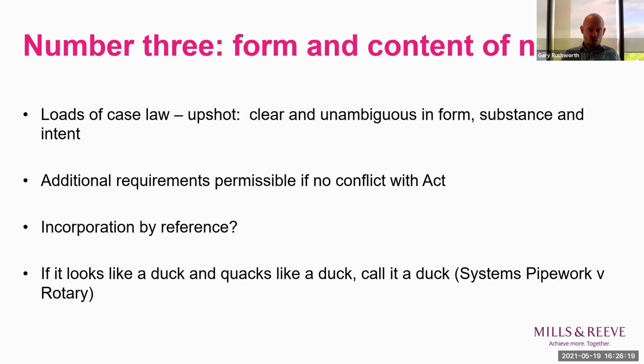Over the years, there have been loads of cases in which parties have argued over whether a notice or a payment application was valid under the contract, whether it was in the correct form, whether it had the correct contents. I'm not going to go through all the case law because we'd probably be here all night, but the upshot of it all is that regardless of whether you're issuing an application for payment or a payment notice or a pay less notice, it should be clear in substance, form, and intent what the document actually is.